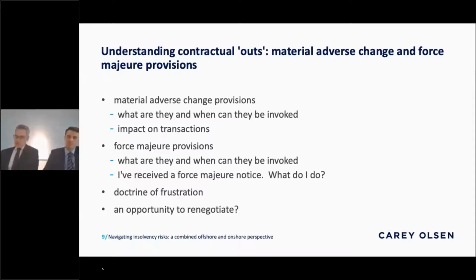If you are a party to a contract and you receive from your counterparty a notice that the counterparty is invoking force majeure to not perform the agreement, what should you do? Before you accept that notice to suspend or delay the contract, you generally need to get comfortable that it's valid and does not constitute a breach of the contract. You will need to act very quickly to ensure you're not deemed to have waived your rights or acquiesced to the claim unnecessarily. Note that the fact that the counterparty is in financial distress will not of itself usually allow the party to invoke the force majeure provision.